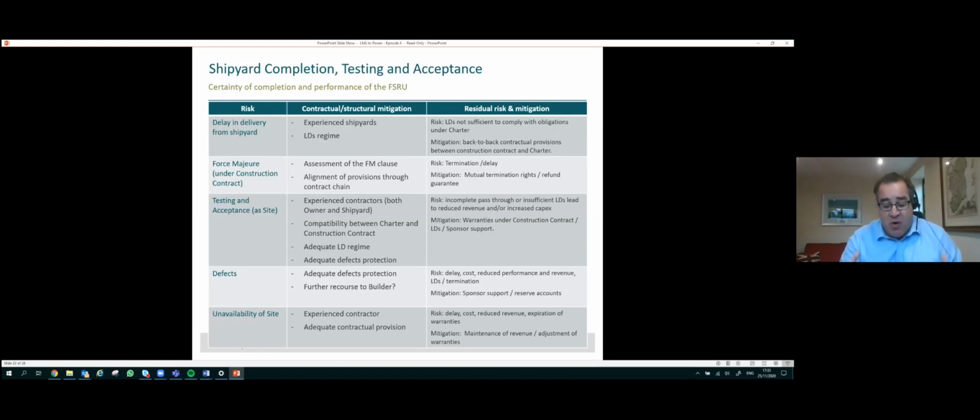Usually it is not possible for all of the unit's technical capabilities to be fully tested at the shipyard, in particular in relation to the rate that the FSRU is able to send out regasified LNG, which often can only be tested fully when the unit arrives at the project site, where there are facilities to receive LNG and discharge regasified LNG. However, title in the FSRU will ordinarily pass from the builder to the FSRU sponsor on delivery at the shipyard, not at the project site. And therefore, there will need to be a significant testing regime set out in the construction contract, under which, as between the builder and the FSRU sponsor, the builder is responsible for undertaking the remaining testing of the FSRU upon its arrival at the project site.